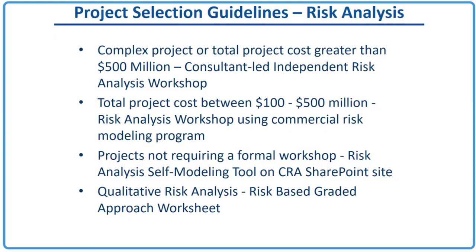Projects not requiring a formal workshop are typically less than $100 million total project cost. The project manager and the district estimator can use the risk analysis self-modeling tool on the CRA SharePoint site, which I'll give a reference to a little bit later.